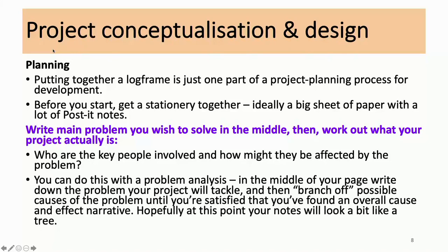Write the main problem you wish to solve with this project in the middle of the page and work out what the project actually is. Who are the key people involved? How might they be affected by the problem? What's the impact of the problem on these people? You start writing all of these notes around this problem on the paper. You can do this, what we call a problem analysis.